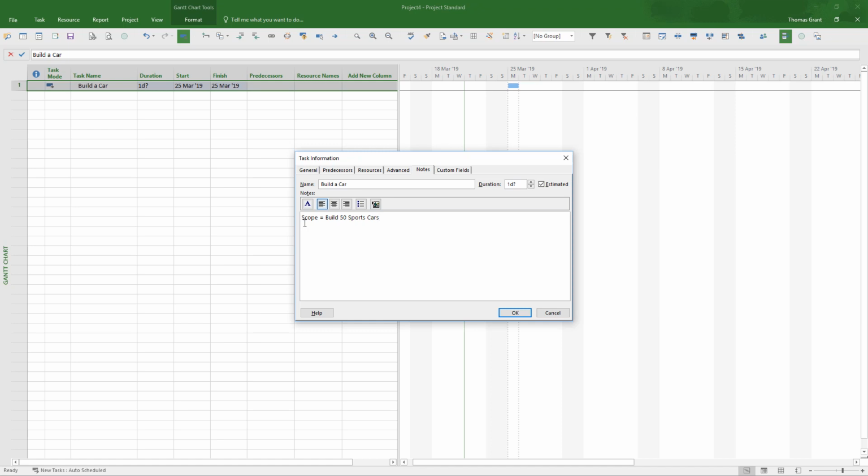So they're going to be 4-litre cars, 2-seat, open top, all red, built on pretty much existing components, but with a unique shape and body. That's the scope of our project. Budget for the project is going to be 50 million. And our timeline is going to be 6 months from start date.